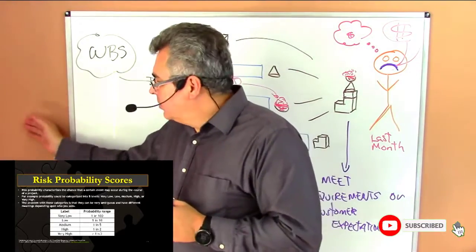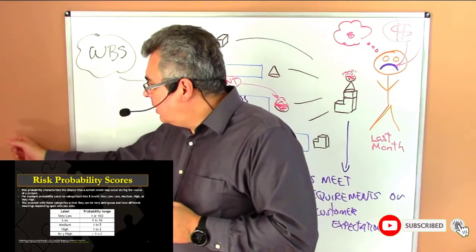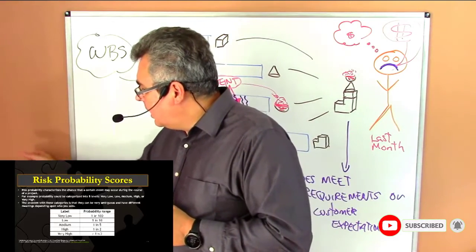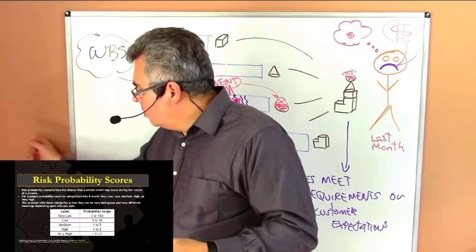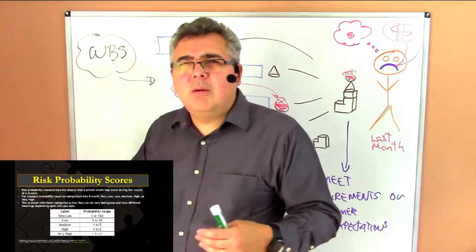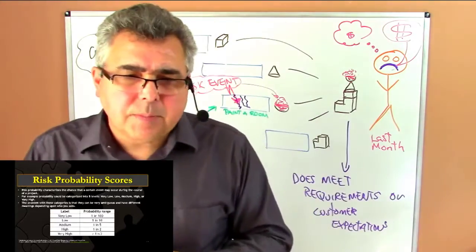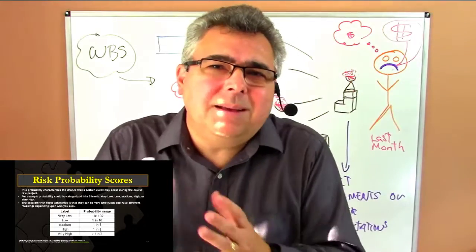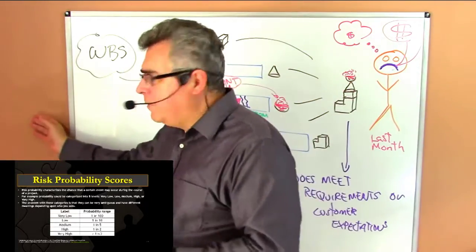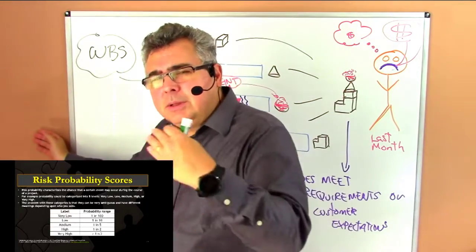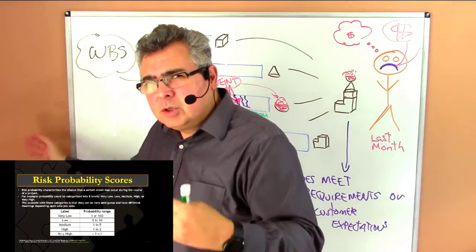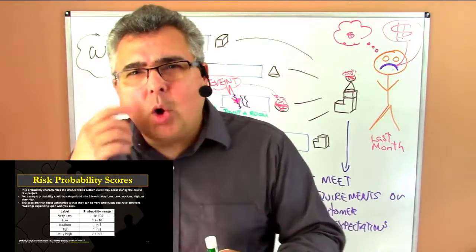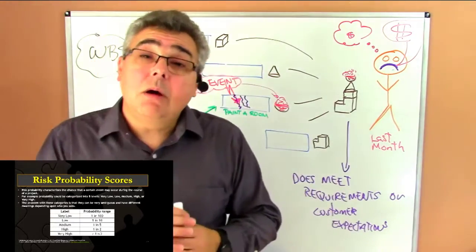The drywall — when I try to paint, sometimes the drywall is damaged, and when I push, I find a hole in the wall. So that's a problem — a big problem. If I find that, I have to spend more money to fix it. It takes more time as well. So that is an impact on time and cost. That's a risk.